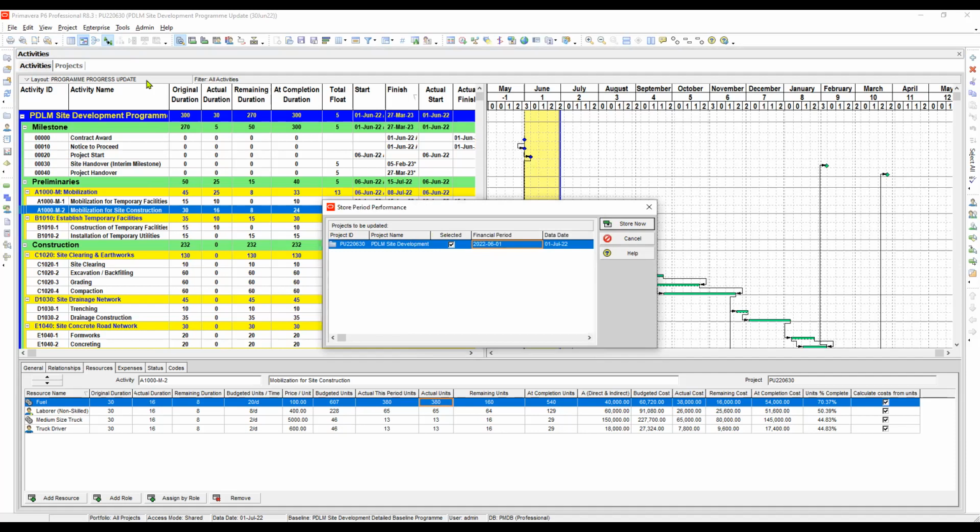Okay, June 1, 2023 to the data date, which is July 1. You cannot change this one because it is our default data date. So what we have changed only here is the financial period for June, from June 1 and for the whole month. Okay. So we will run this now. Look at this data here at the bottom of the resource assignment window. This period units will disappear, and it will become blank, or all zero. Okay. So let's run it.